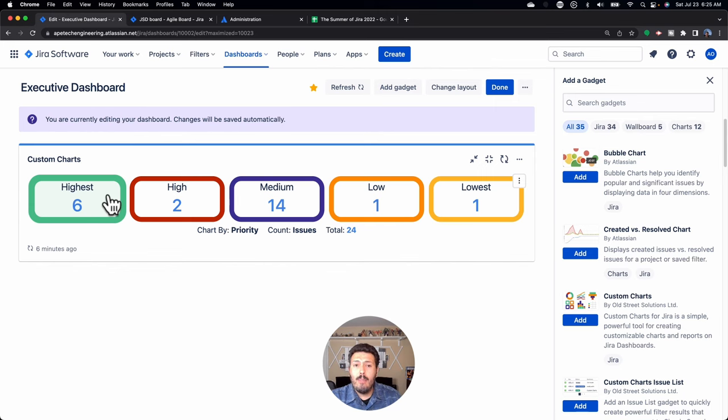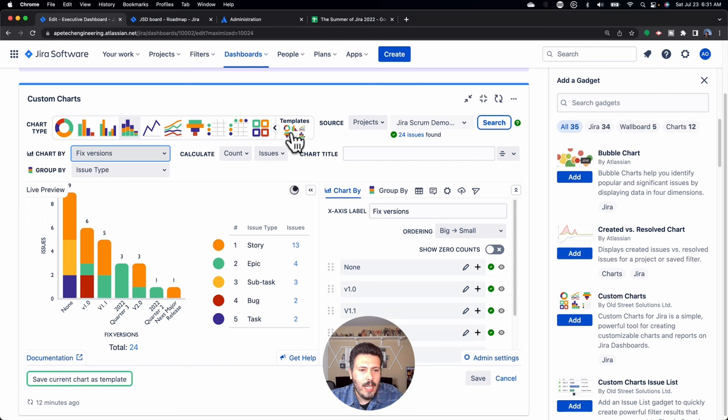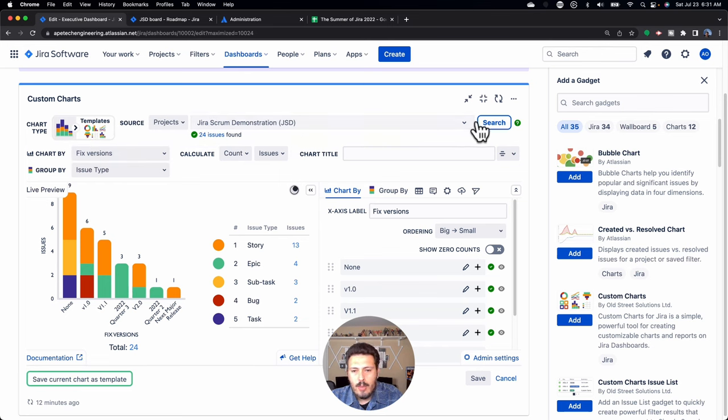Next, let's look at things by release. The next chart we're going to display is our fixed version breakdown. We're going to use a 2D stacked bar chart as the chart type, same project from before — just make sure you have a project. Now we're going to do a group by issue type, because for this breakdown I want to see by each release what kind of issues are going into it. When you're planning releases, you want a healthy number of features, a healthy number of tech debt, and a healthy number of bugs going into each release. This graph is going to help us visualize that decomposition of what's going into each release.